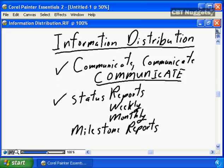You need to ensure that you're delivering the appropriate status reports, whether it's a weekly status report or a monthly status report, to the appropriate stakeholders, and that these status reports contain true, honest, open project status. Do not hide problems. Manage problems, deal with problems internal to your project to the point where you as a project manager have power to influence the problems, but once the problems reach a point where it's beyond your capacity to effect improvement, it's your job as a project manager to ensure you're communicating, delivering full, honest, open status reports to the project stakeholders, to the project sponsor on the identified frequency. Weekly status reports to your project sponsor and monthly status reports to senior management and other project stakeholders.